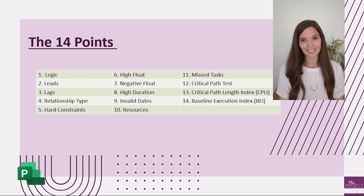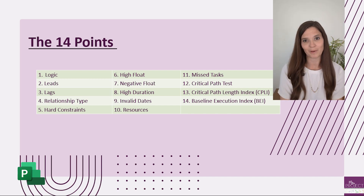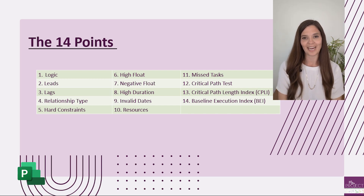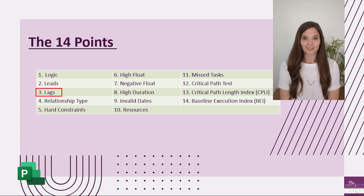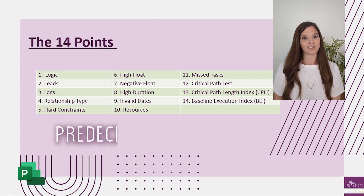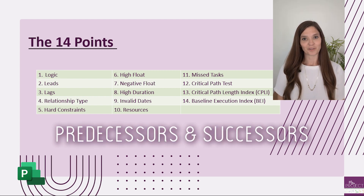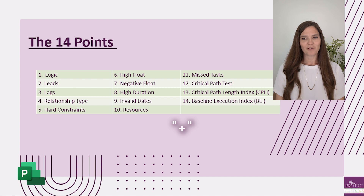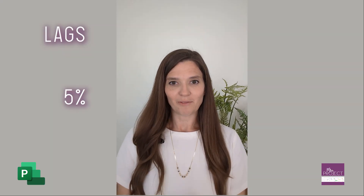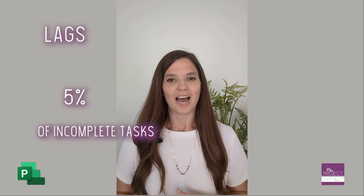The third DCMA 14-point metric is looking at lags. Just like leads, it's looking at predecessors and successors and looking for a positive number. DCMA does allow 5%, so if 5% of your total open tasks have a positive lag, it is allowed.